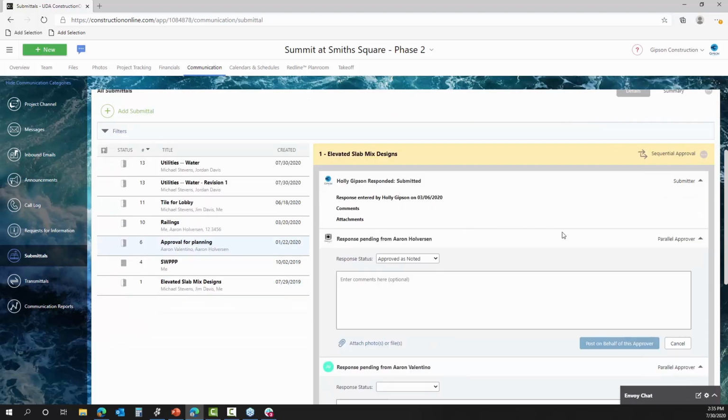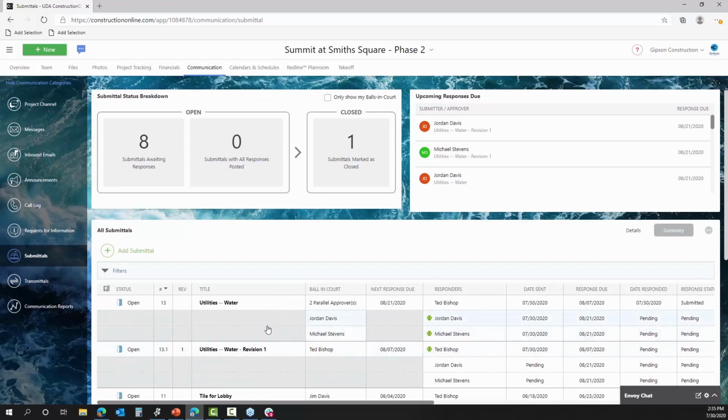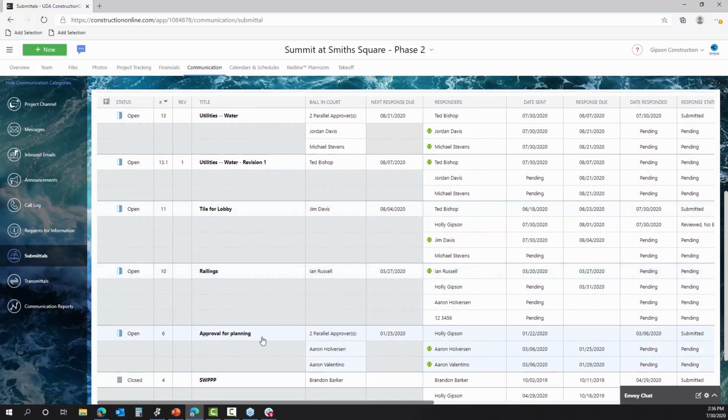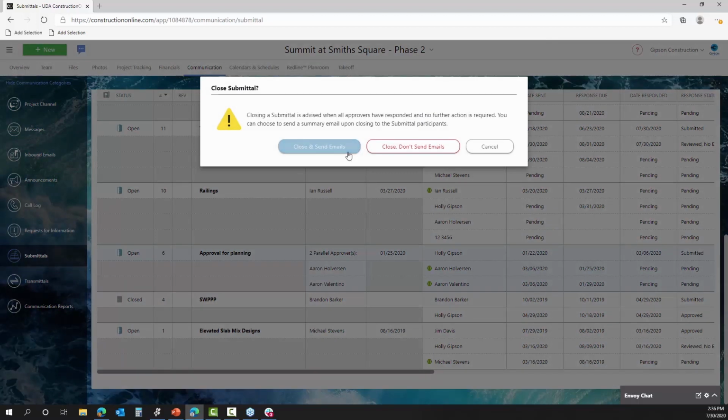In some cases, you might not actually reach a point where the submittal has every single response posted because it doesn't need it. In this case, what we've recommended is to just mark that submittal as closed and then spin out a revision for it, so that your team knows the previous submittal stopped at this point from this response. We've moved on to the next phase where we're gathering the next materials of the revision. So it needs to bounce back out to, let's say, the subcontractor to revise and resubmit, and the process kicks back down the line again. And this could happen 2, 3, 4 times.